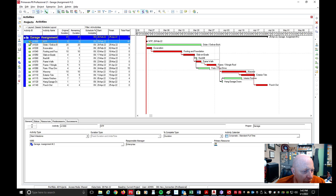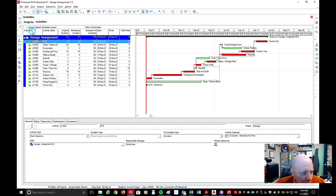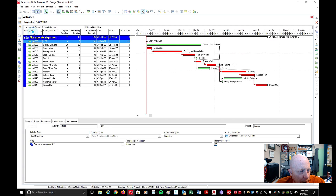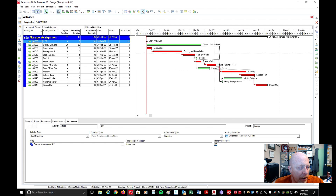If your Activity IDs are out of order, you can click on the Activity ID column header and it will reverse the order. As you can see, my schedule is now backwards — so I click on Activity ID again and it will put all my Activity IDs back in numerical order. Some of you may have had a question with that if you entered activities and got off a little bit — just click that Activity ID column and it should put it in order.